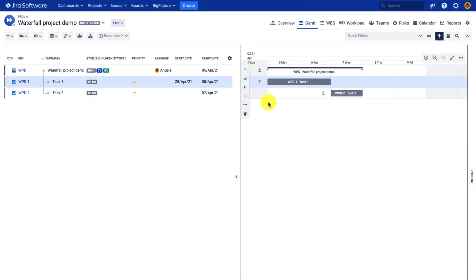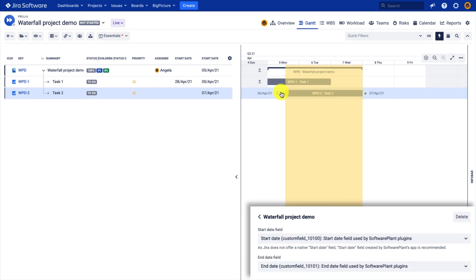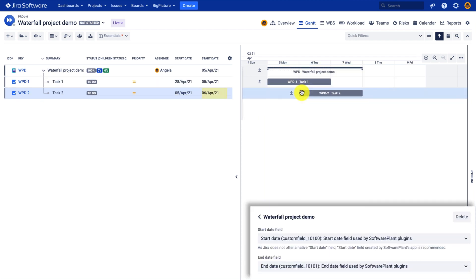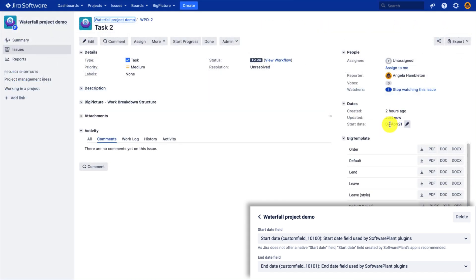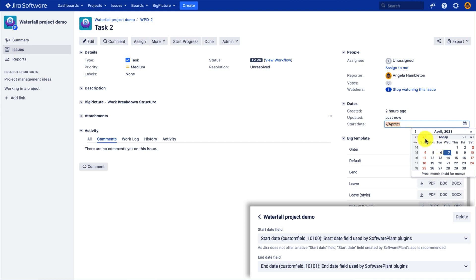Now we are back in the Gantt view. Let's see what happens when we drag and drop the left edge or the start date. You'll see that both start date fields — the Jira native field and the building one — will get updated. And if you change this date in Jira, it will be immediately reflected when you open the Gantt module, since the synchronization is instant and bidirectional.